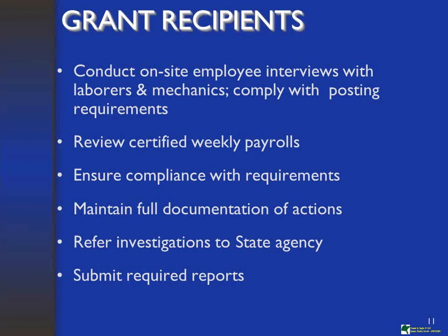Another aspect of administration and enforcement is conducting on-site employee interviews. That's literally going out on site and randomly checking various subcontractors' or contractors' employees and talking with them. Just randomly selecting, or there may be some systems that people have in place to check certain electrical trades one week and plumbing trades two weeks from there. However it's done, it's one of those aspects of administration and enforcement that must be done.